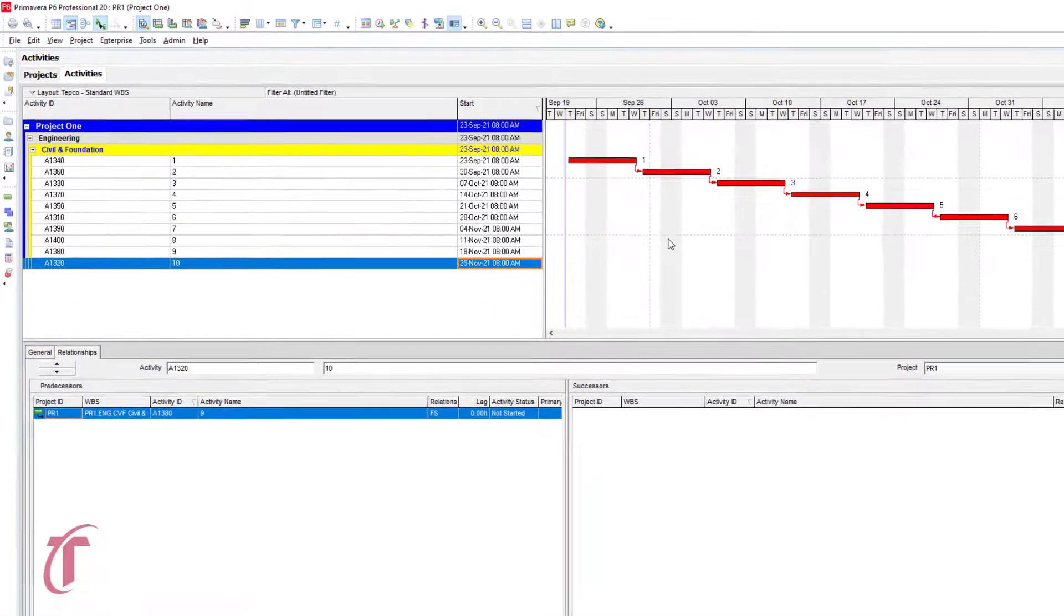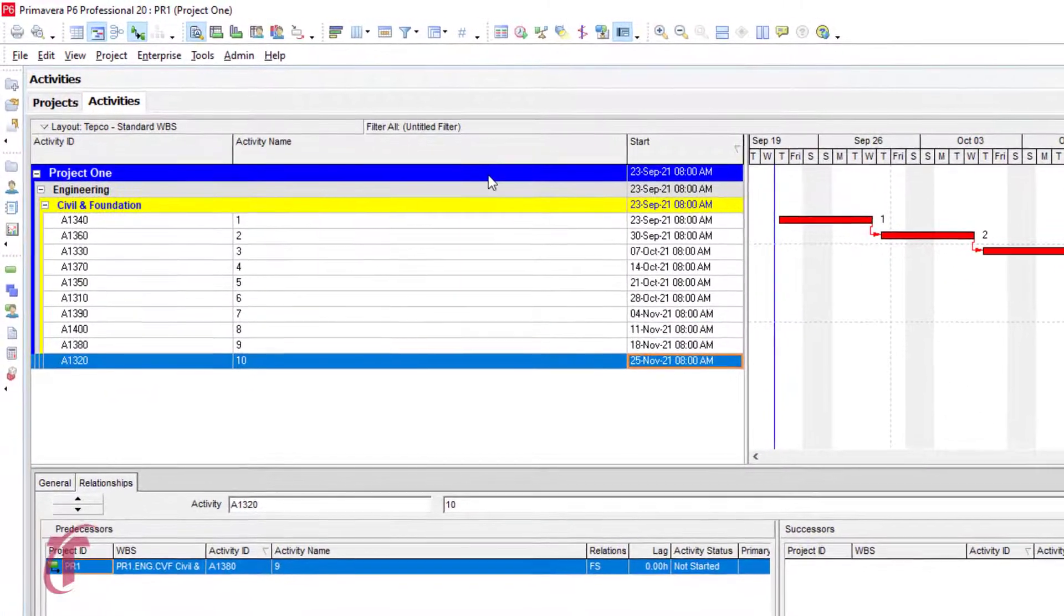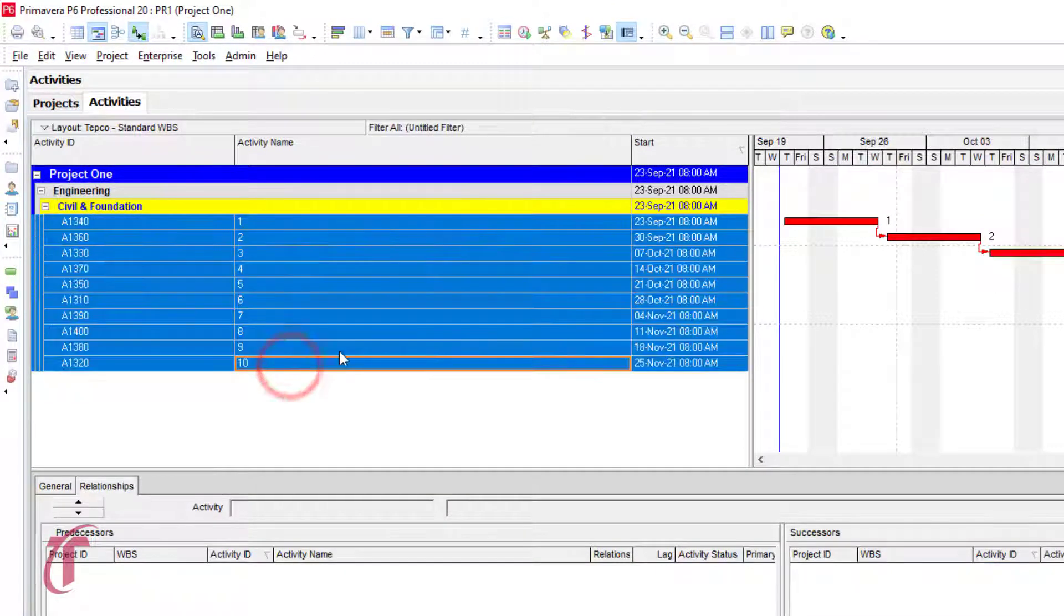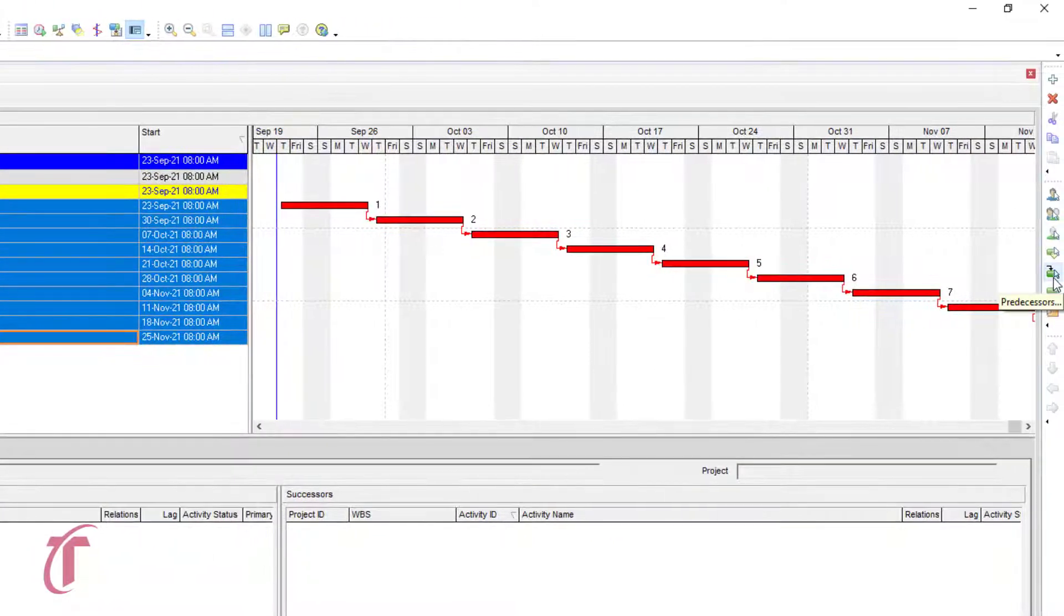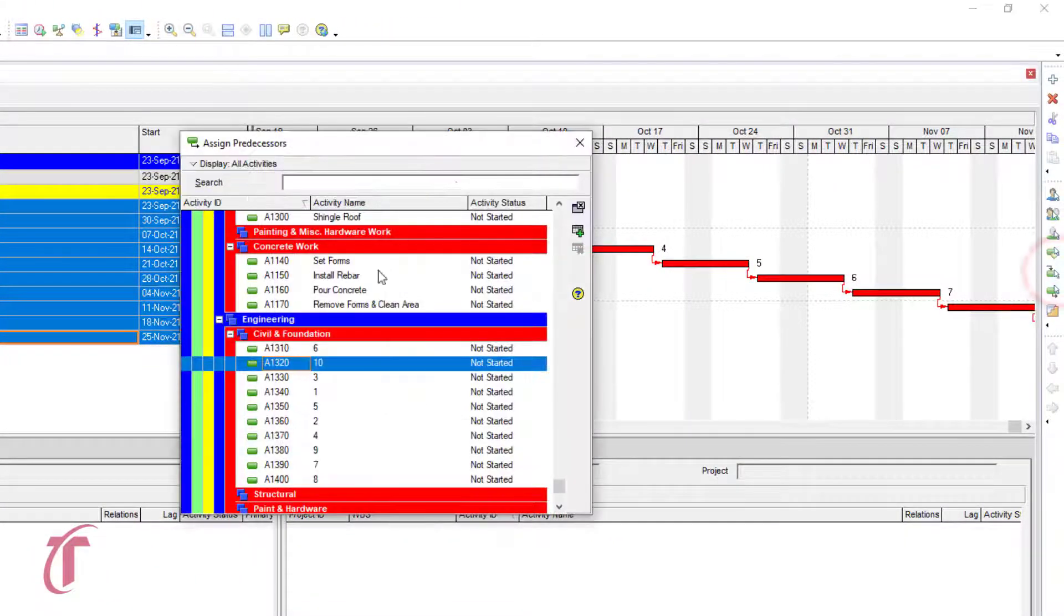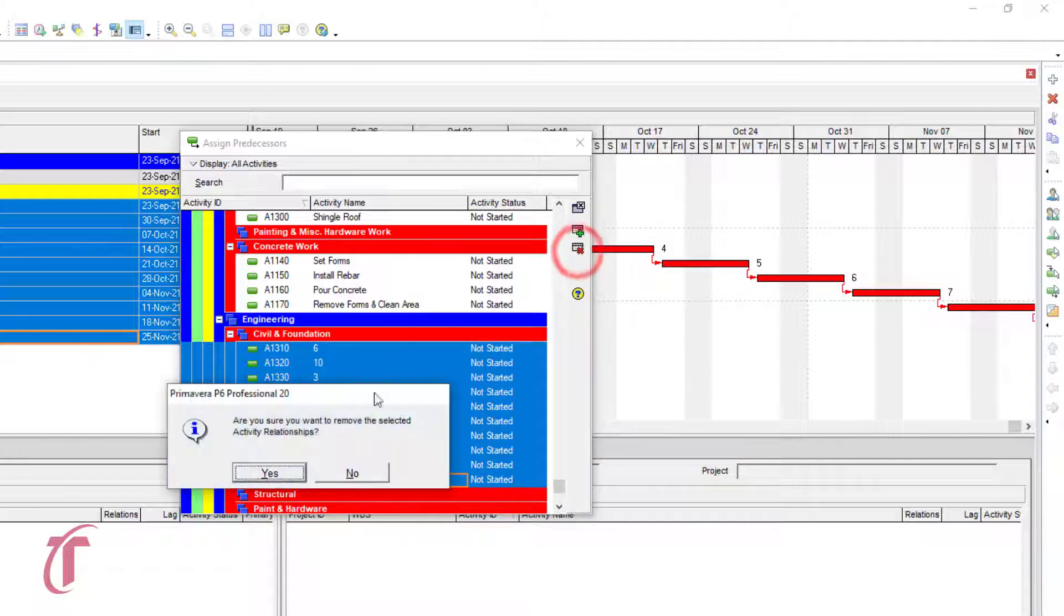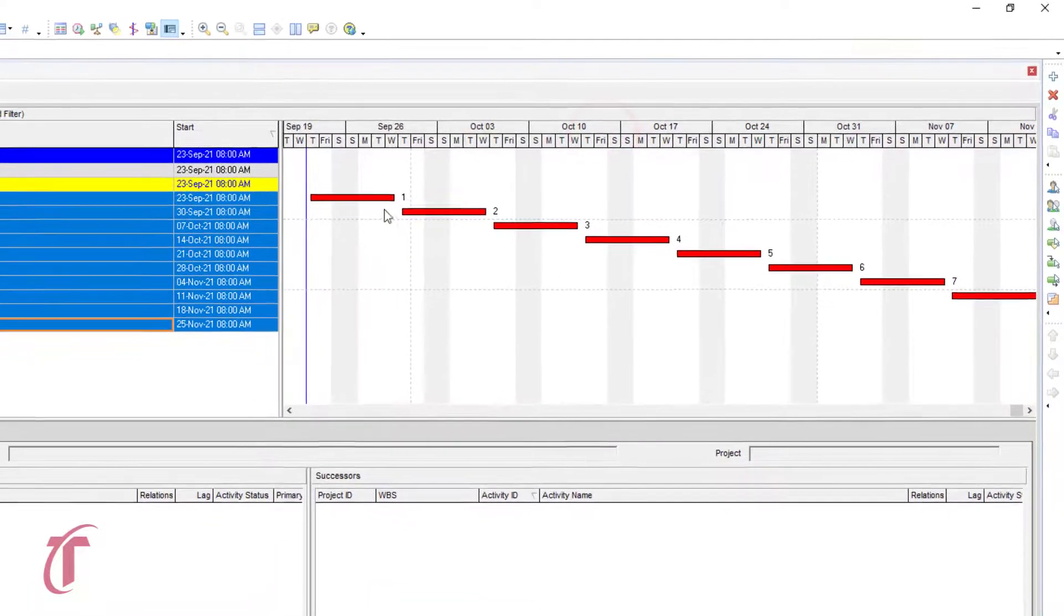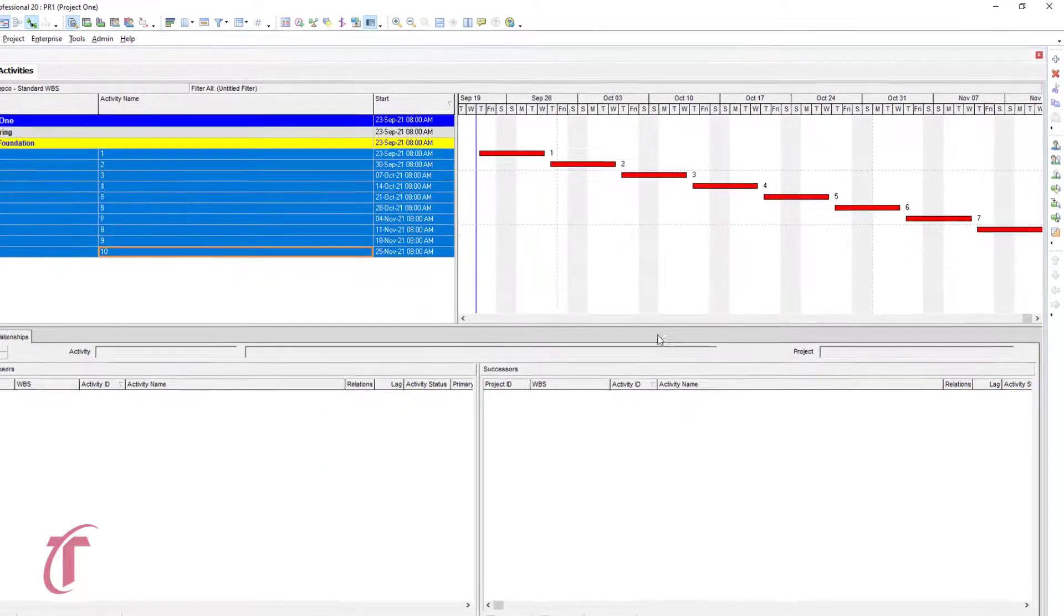In order to look at the next method, we need to break the logic that we just tied. To do this, we can select, hold shift, and then select the bottom. And then over on the right hand side, we'll click on this predecessors. And we'll start at the top, select, grab the bottom, and then we'll click on the red X. We'll select yes. And so what we see in our Gantt chart is that those relationships have been removed.